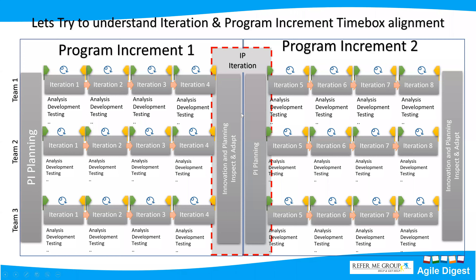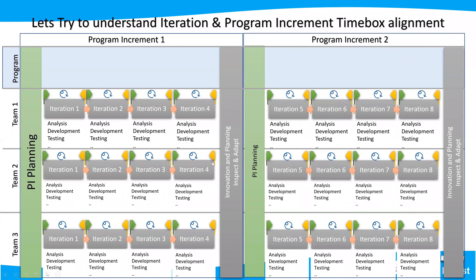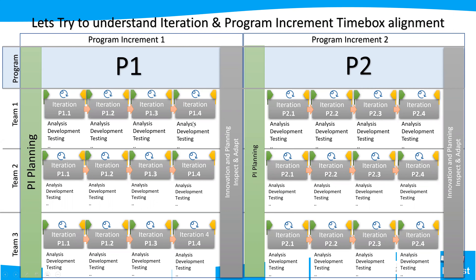Within a program, a Program Increment is executed, and at the team level we have iterations 1, 2, 3, 4, then innovations and planning. Teams commonly name iterations using a convention like P1.1, P1.2, P1.3, P1.4 for PI 1, then P2.1, P2.2 and so on for PI 2. All teams follow the same naming convention for the same duration — that's the common naming approach.